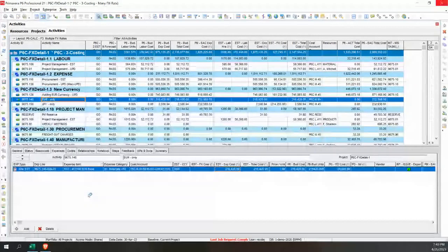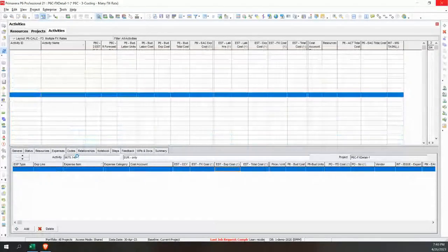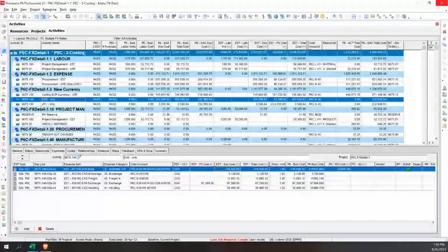So that's another type of thing that we've modeled so that we could do the histograms, because the crew is not the trade that performs the work. And we needed to understand the individual tradespeople on the job site so that we could get the right number of people to the project. Particularly if you've got a remote job site and you've got camps, those are really important because you can only have a certain number of people at the job site because you only have a certain number of beds. So that's always a tricky one.